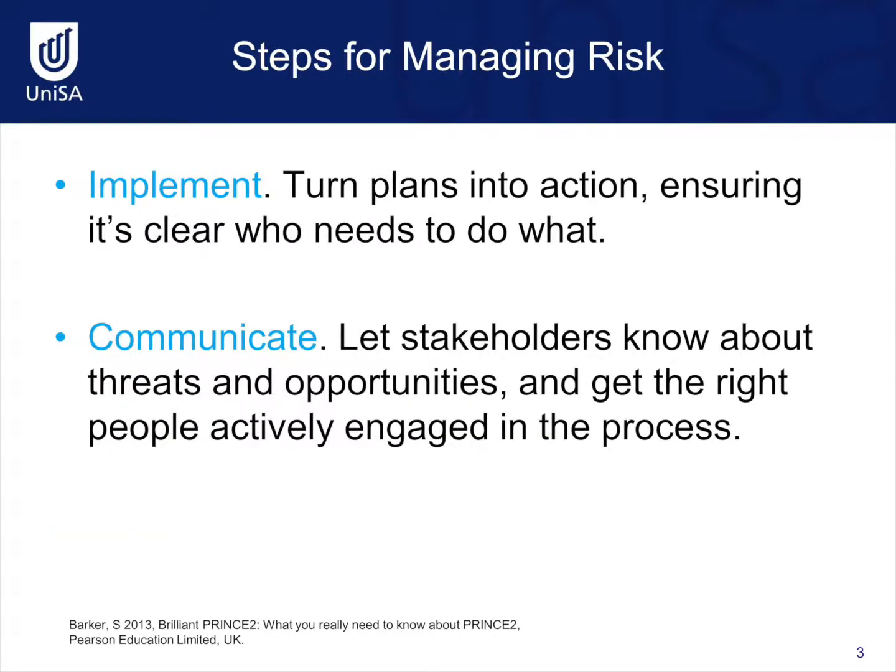The next two steps are to implement and communicate. When implementing risks, we turn the previously documented plans into action, ensuring that everyone is clear on what needs to be done when dealing with the risk that has occurred. When communicating risks, we let the stakeholders know about threats and opportunities and make sure that we get the right people actively engaged in the process.